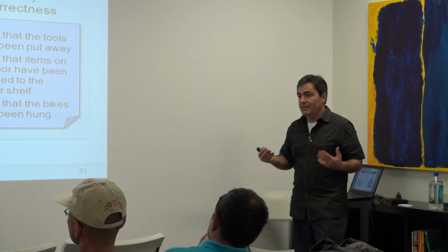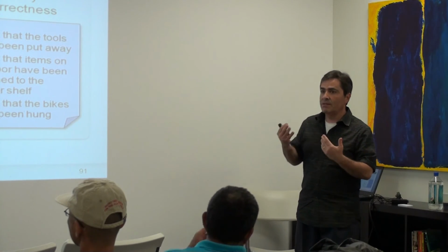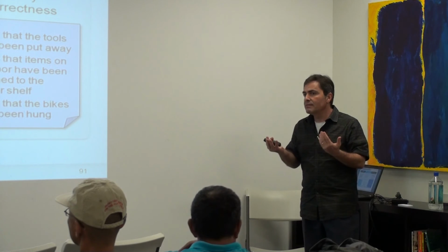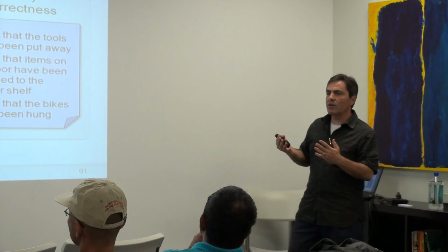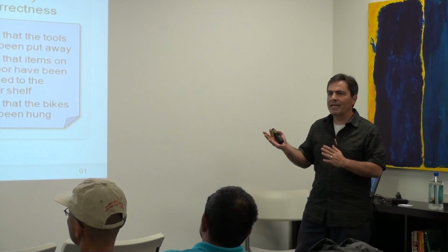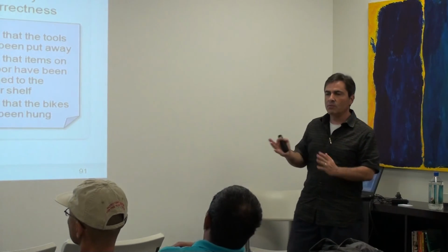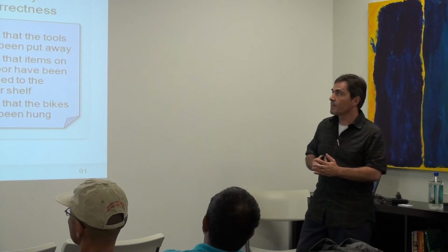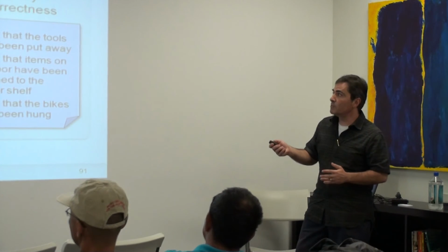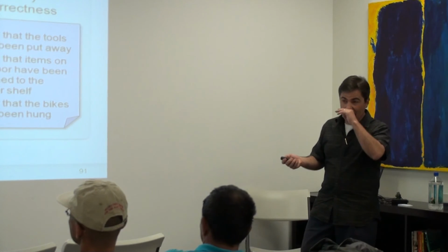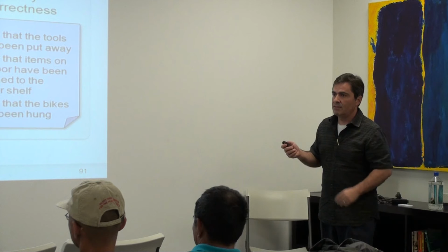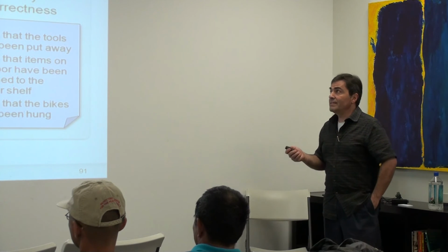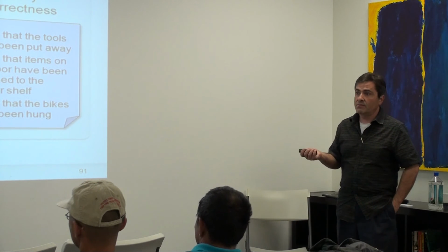Without that, it becomes kind of a monologue, and it actually becomes really hard to be agile if you can't have good conversations with the business. And then finally, we have the confirmation. This is where all the details go. And the template for that is "verify that." So this is where all the details of the user story can go.